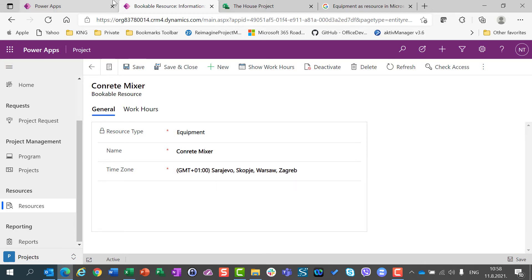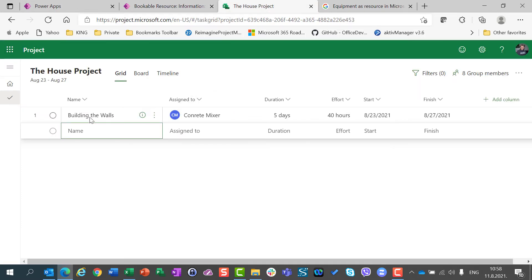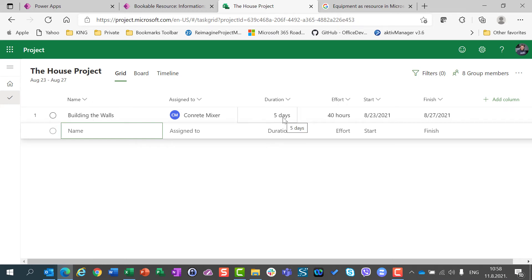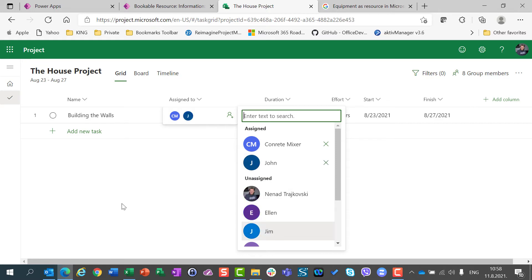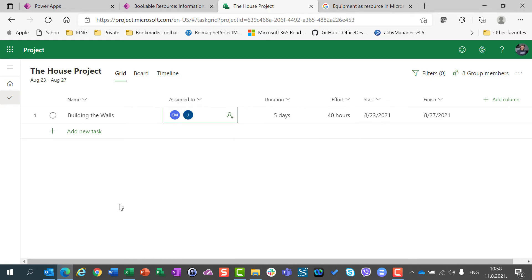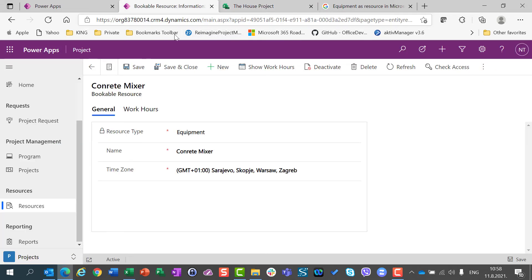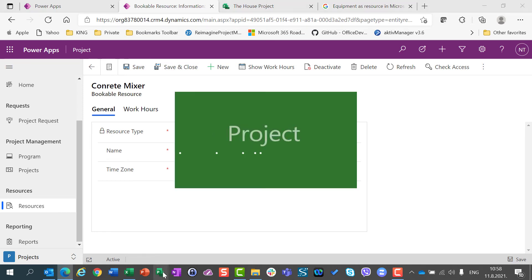So, if I want to say that I want for the house project that I'm going to build the walls, that I need concrete mixer, which will work five days and it will take forty hours, and that I have, I need, let's say, for example, John, which will also work with that mixer forty hours. But I need also, let's say, thirty bricks or 100 bricks. I cannot do it because, as it for now, there is no possibility to here have material resource.